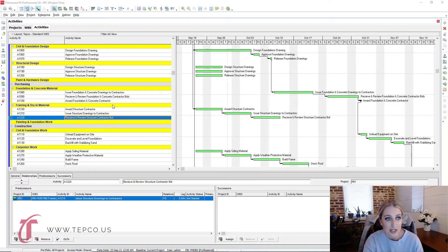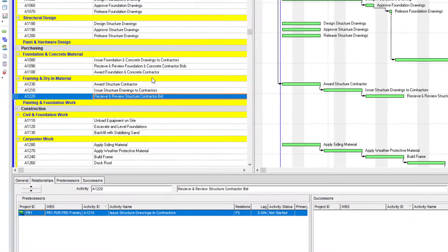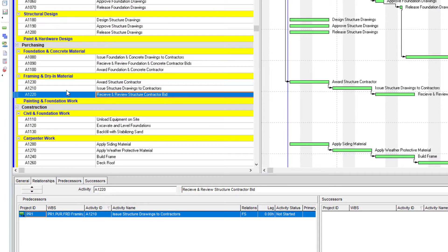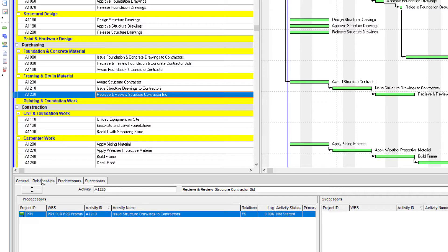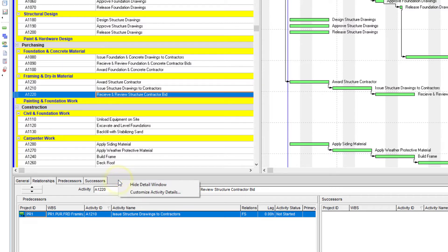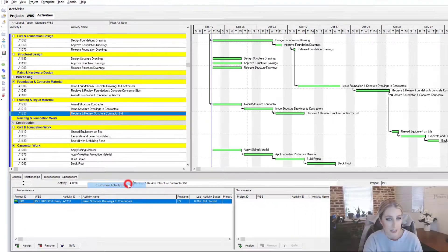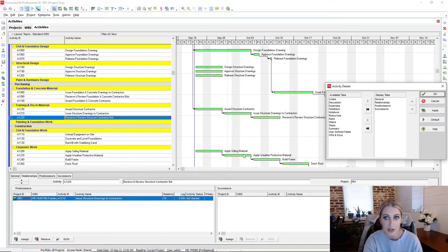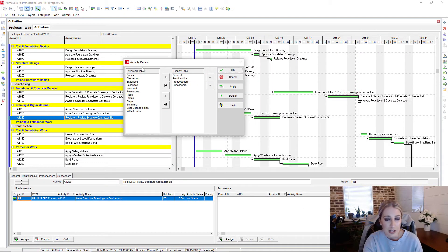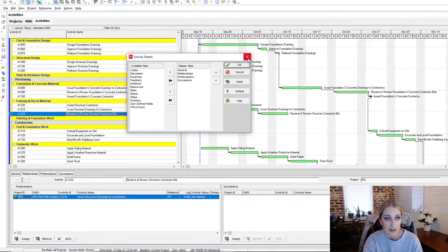So in our activity screen that we see here, I'm highlighted on this activity. And at the bottom, notice we have this relationships tab. If you don't see the relationships tab, you can just right click right here, customize details, and then you could find that column over here and add it in.